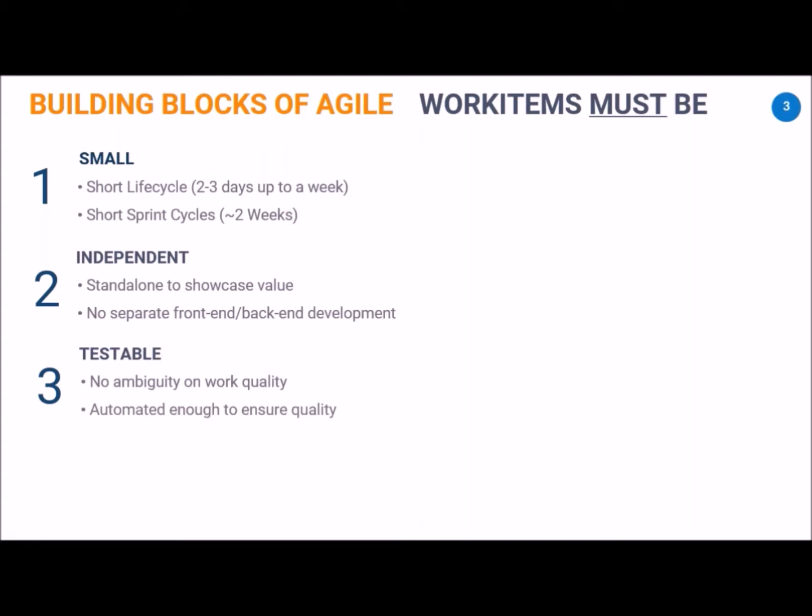We cannot get into a situation wherein other sprints are doing manual testing just to confirm that what was built in the previous sprint is working properly in this one, again adding to the overall cycle time. So of course we will have to have some layer of integration testing and system testing, but as much as possible we should have the unit testing covered as part of the work item itself.